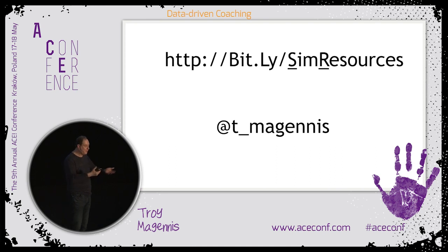So often it's actually importing lots of different data from different tools and having to merge it into one, which is why I'm so sold on just the 3 data points I need: the completed date, the started date, and the type of work. And you can often get those out of any of the tools. I tend to go in and do that custom for companies, but if I have a spreadsheet, it's not a lot of data to transpose.